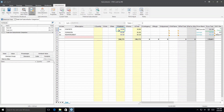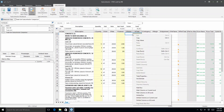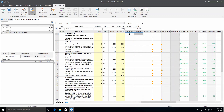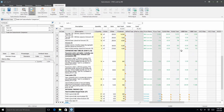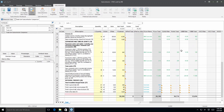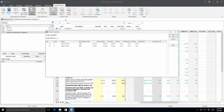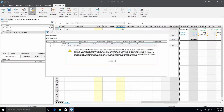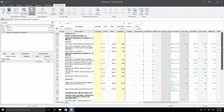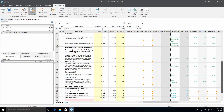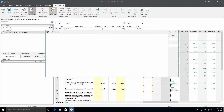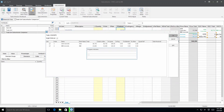We'll now drill down to the second level of the concrete trade, and for easier navigation we can hide columns G to H which we won't be using at the moment. Now click cell I1 and select freeze columns, then use the horizontal scroll bar or tab to the right to display the preferred and low columns next to the subtotal column. The low columns have been automatically filled with data. As the single preferred option was ticked for this trade, only one subcontractor can be selected as preferred. The low column is showing one subcontractor for all items because that subcontractor is lowest overall even though their individual rates are higher. To demonstrate this principle, untick single preferred option — we can now see that the low column is showing the lowest price for each item. However, in this instance we wish to retain single preferred status, so we re-select the single preferred option from the trade properties and then return to level 2.